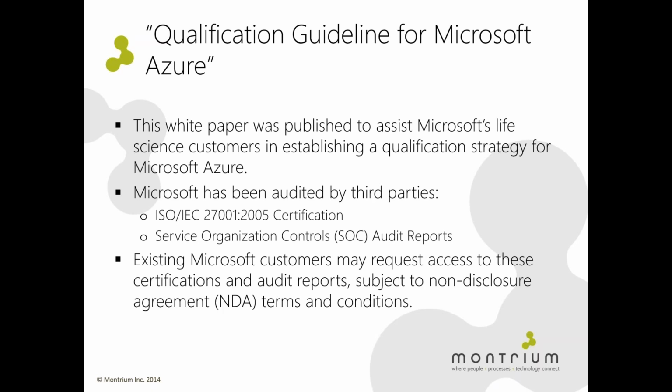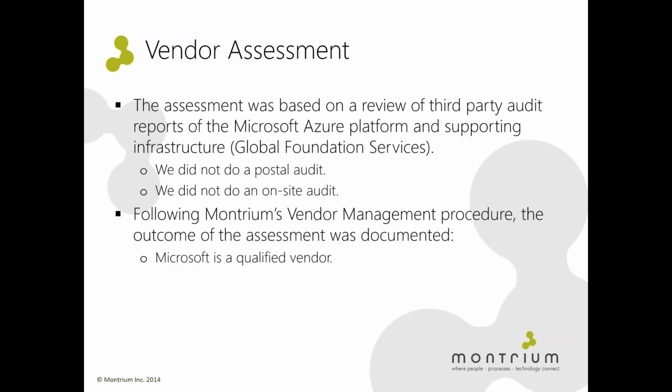Any existing Microsoft customer can request access to these certifications and audit reports subject to the terms and conditions of non-disclosure agreements. And that's exactly what we did. We requested copies of those certifications and audit reports from Microsoft, and we reviewed them internally. Basically, we looked for things that we can map to Part 11 and to Annex 11. So we didn't do any postal audit, we didn't do any on-site audit, we simply reviewed the available documentation.